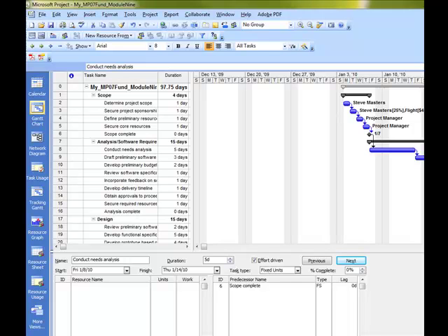So it's going to take the 5 days, multiply it by the units in Kim Rawls, and multiply it by Rob Young, each taking up 40 hours to give us a total work of 80 hours, even though only 5 days are going to elapse, because both Kim and Rob are working full time against that particular task. Okay?